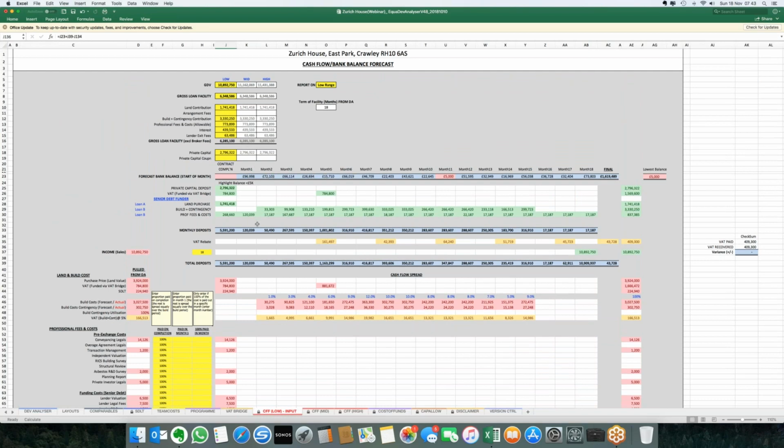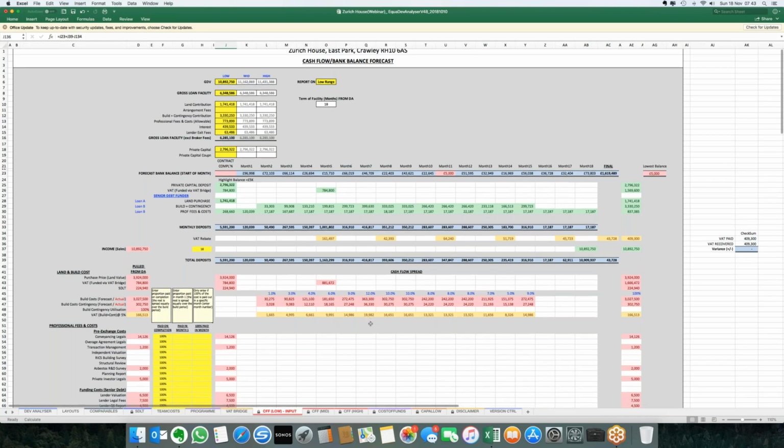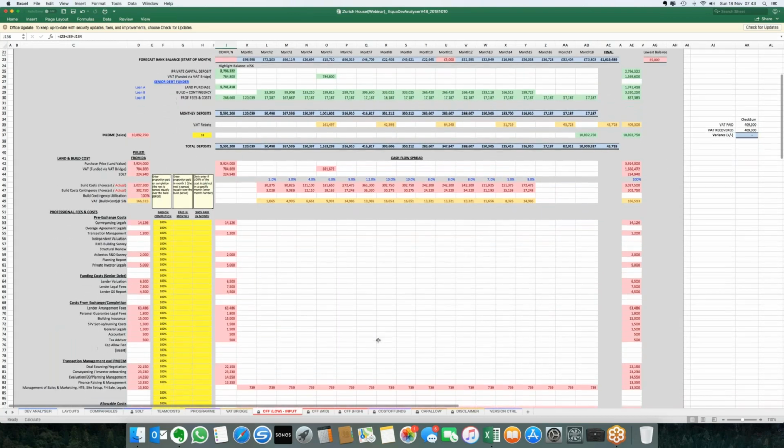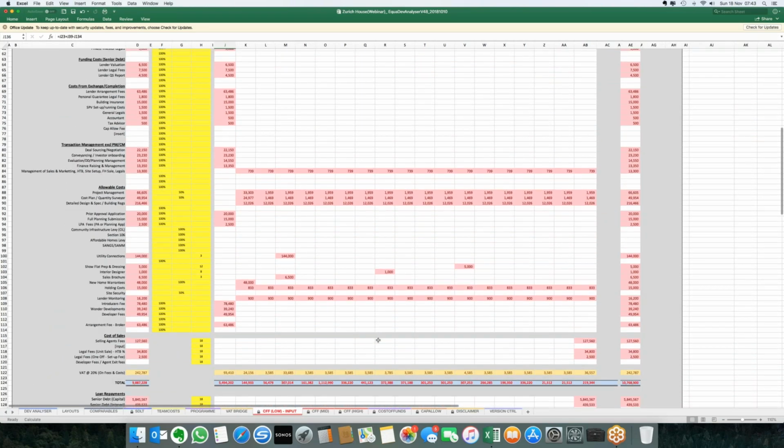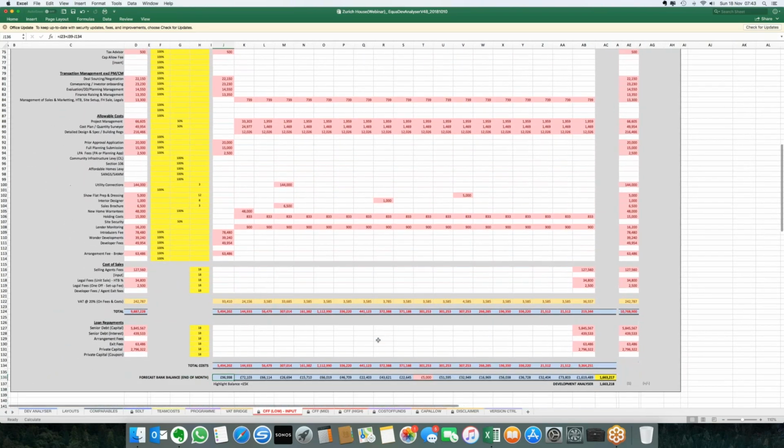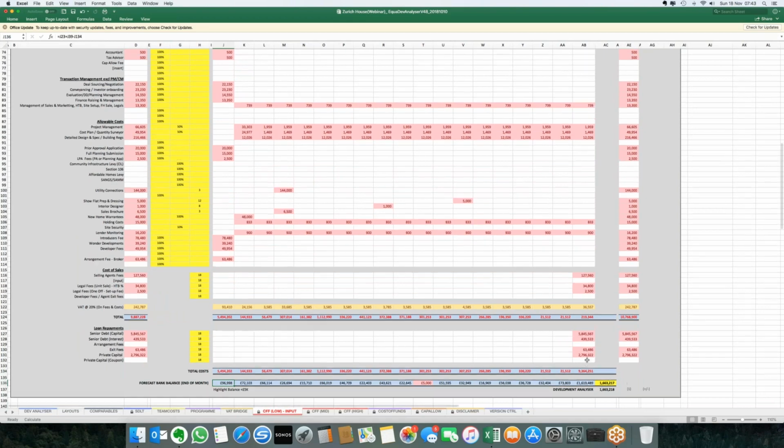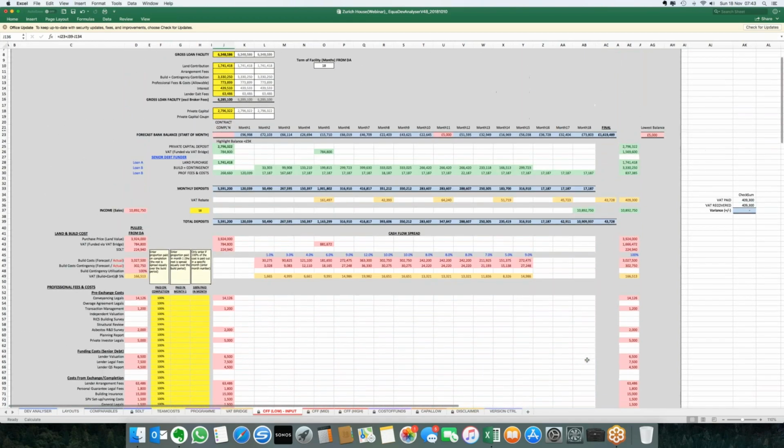That's based upon a simulation of drawdown from the main contractor. It deals with VAT payments. It deals with all the professional fees being taken all the way through the deal. It looks at all the costs associated, and then it looks right at the back end on the income coming back in. So those cash flows are run, and then what we do, we target a minimum.